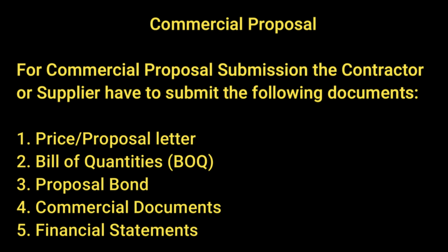Next is proposal bond. Mostly it is required to submit a proposal bond, and its common practice is 1% of the total amount of the project. Next is commercial documents. Contractor has to submit all his company commercial documents like registrations, registration with Chamber of Commerce, tax certificates. Next is financial statements. For commercial proposal, it is required to submit the last few years' financial statements. Mostly 3-year or 5-year financial statements are required.